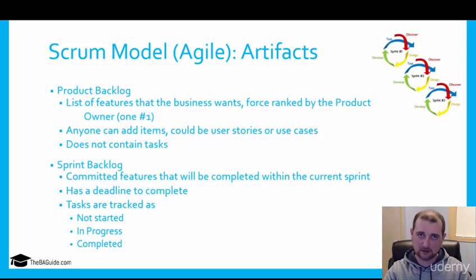They have a deadline to complete it, obviously at the end of that sprint. Where the product backlog, there's no deadline, it's just an ongoing list. And there may be features that are put in there, and quite frankly, there will be, that'll never be realized. They'll just keep dropping to the bottom of the list, and they'll never be put in because it's a good idea maybe, but it's not really very useful, or the return isn't very high, and so they get lower priority.